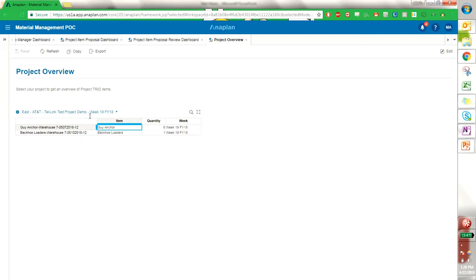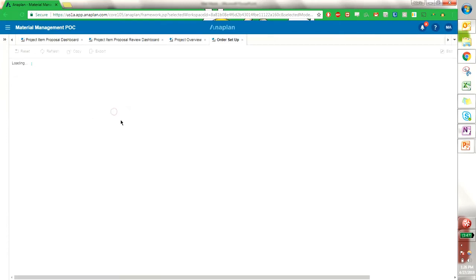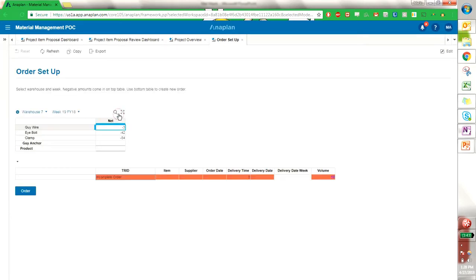So now how does that affect the warehouses? If we go into the warehouse manager dashboard to see how the volume of this proposed project and project items have affected our warehouse levels, we can go into our order setup as a warehouse manager. I can select my warehouse and my week, and I get the negative amounts of volumes appearing here. So this means that due to the project needs that have been approved and project items that have been approved, we have negative volumes for this week, which means we need to create an order.